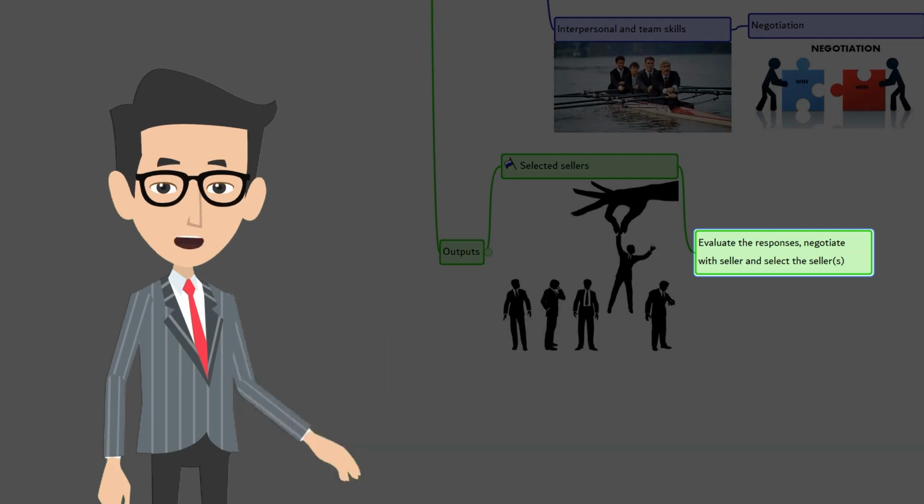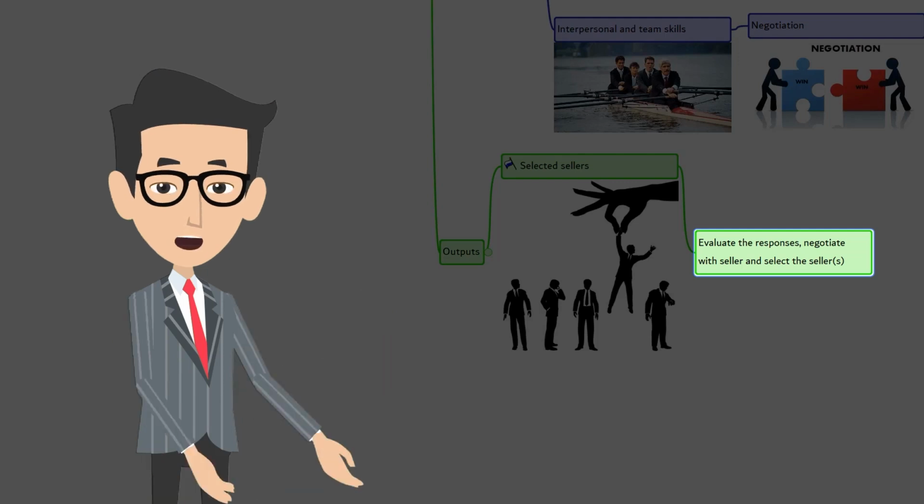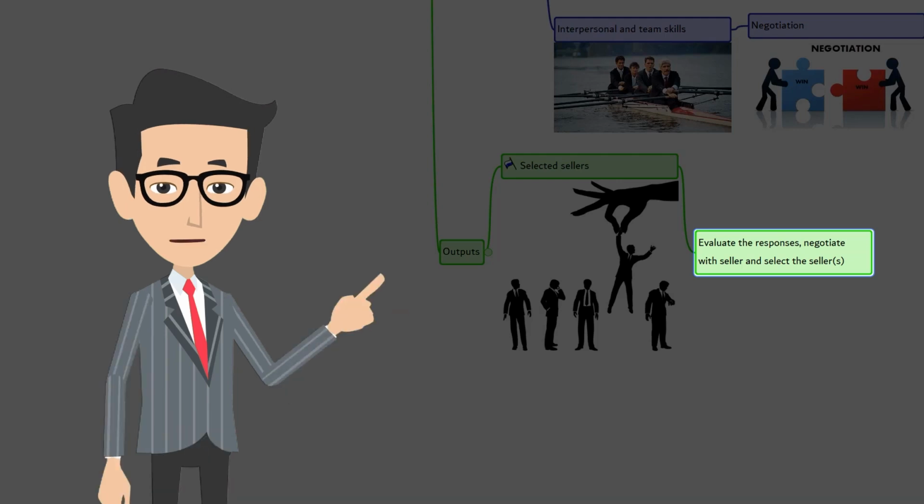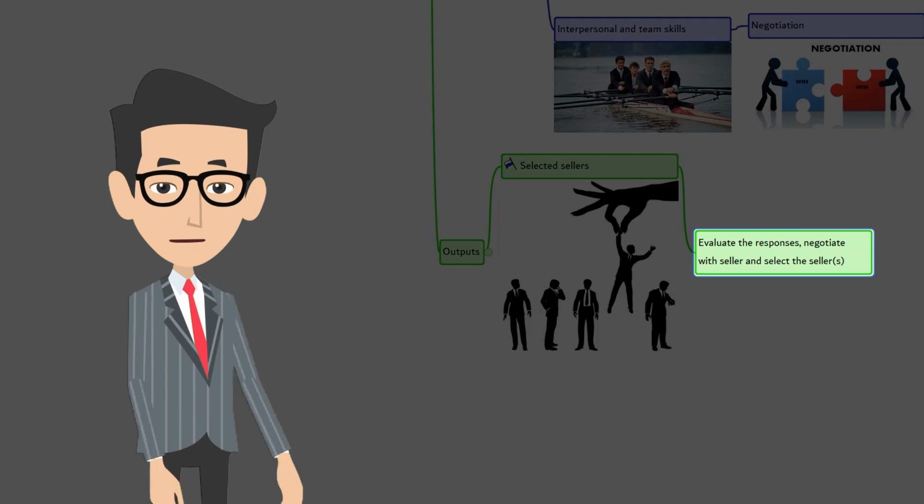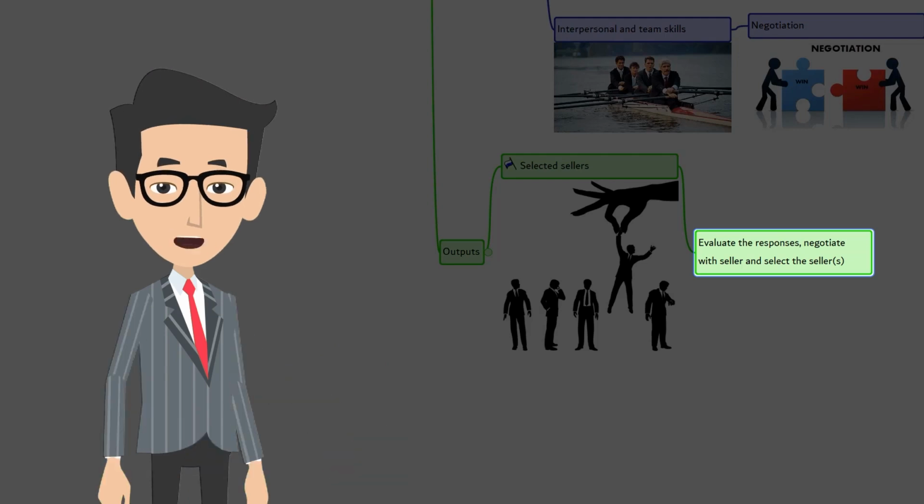This means that the buyer and the seller have agreed and signed off on all terms and conditions of the contract. Then they will move forward to create the product or service. Typically, senior management approval is required before awarding the contract to the seller when the procurement has higher value or high risk or complex deliverables.